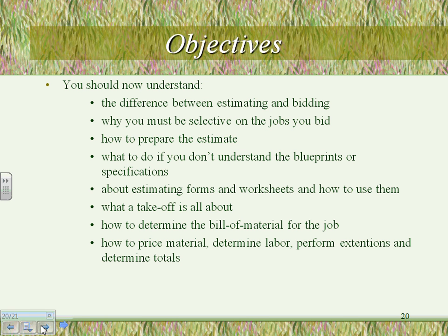On page 61, they do the extension and totaling. Pricing and labor, worksheet number 2. Let me just do one example, guys. On page 61, I have a 4x4 inch box. Okay, look how they do the dollar for it. I have 30 of them. Multiply that 30 by 59, $59, and divide by 100. Why did I divide by 100? Because this is per 100, and it'll give you $17.7.